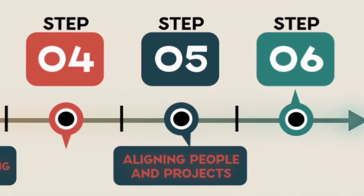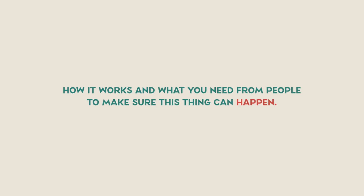Let's move on to section five: aligning people and projects. Let's say you've created a beautiful report — to get it out there and make sure it works, you're going to have to align everybody on what it says, how it works, and what you need from people to make it happen. You'll probably have to teach people about the new milestones and new processes. You'll likely need to do a road show — go out to people, either virtually or face to face — and explain what you're doing, why it's good for them, and how it helps them. If you're working with contractors, you may even need to update contractual specifications so these changes are contractually obligated.